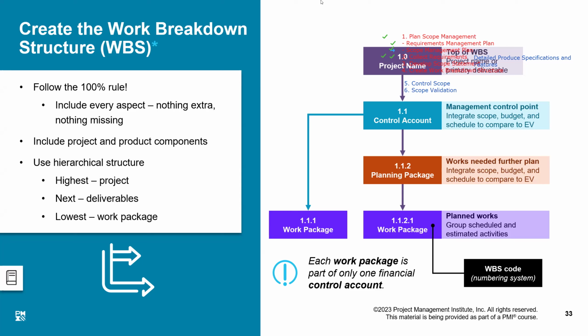That means, from the payment perspective, you will be paid 50% of the amount before you start the work, and you will be paid the remaining when the work is complete. This is a 50-50 rule. Similarly, you could have a 30-70 rule or 80-20 rule, whatever portion you want to suggest.